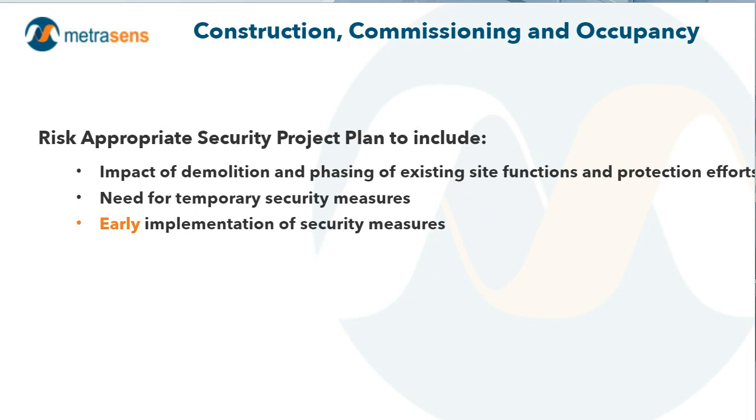As we look at construction, commissioning, and occupancy, the risk-appropriate security project plan should include these areas: the impact of demolition and phasing of existing site functions, the need for temporary security measures, and early implementation of security measures. I know I've been involved in a number of projects, and I hate to get into too many war